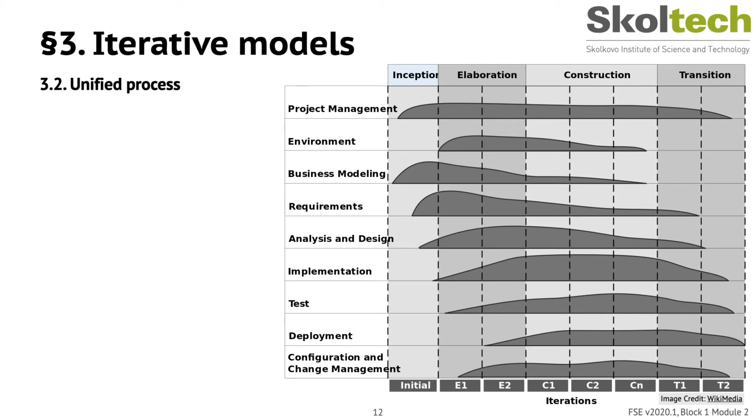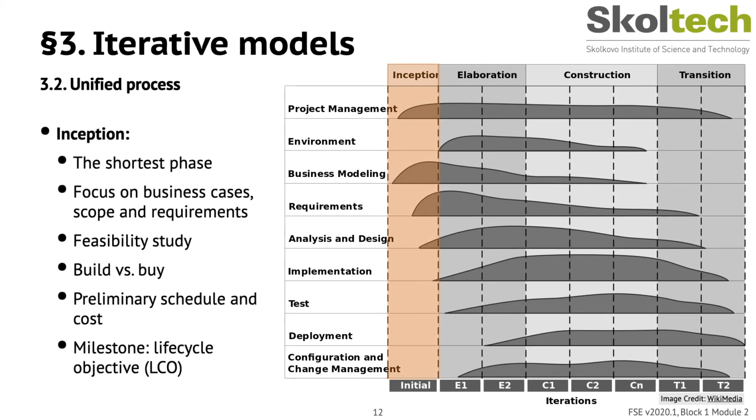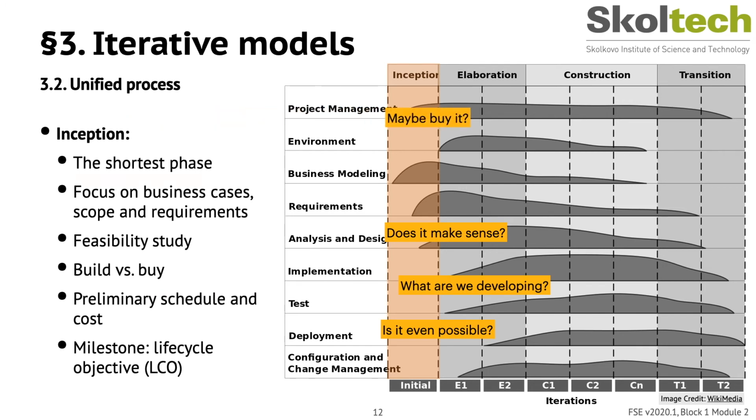During the inception phase, you come up with the project's idea. This should be a short phase where you provide a business case, identify risks, provide an initial schedule, and sketch out the project's general goals. You want to answer questions like, does it make sense? Is it even possible? What is it that we're building? Maybe we should buy it or have someone build it for us.